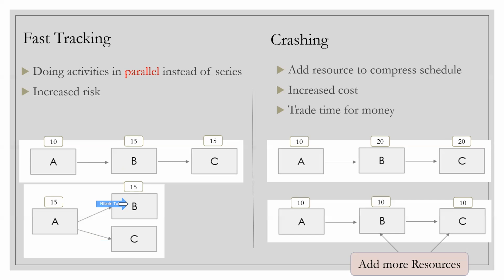When you're doing things in parallel, your focus gets shifted and you are kind of multitasking. It may also happen that when you finish off a cloud project, your SME on cloud will be ironed out or distributed more into multiple activities than one single stretch of activities. So your SME can be distributed over work, and even if a risk happens, then you have to focus. Your focus point also shifts by looking into various lines of work. That's the increased risk when you're doing things in parallel.